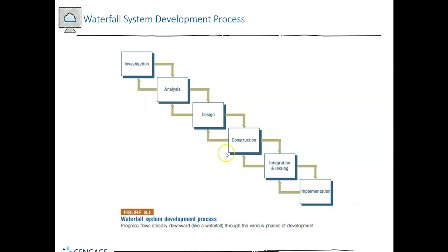And there's a little bit of backflow, but in general, a strict waterfall means it's linear. It's a sequence. One thing follows the other. So the point of all this is that waterfall is very rigid. It's not forgiving. And I want to say it's slow, but the penalty for error is high the farther you get into it, because you don't go back. All right, that's waterfall. And again, that's kind of thought of as the standard default way of doing things.